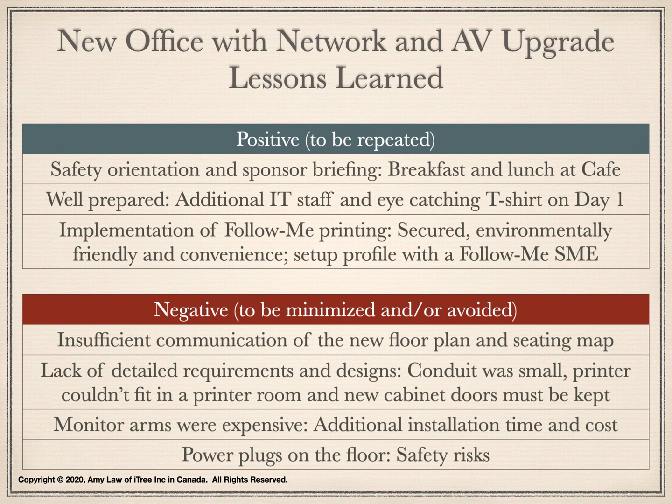The seating map was determined by the senior management. The project had no influence on where people would sit. Having said that, the project could have provided an on-site walkthrough with each team to enable the managers and their people to see their new office space and location prior to the move. Should there be any disagreement, the senior management would make the decision to either make the adjustment or influence their people early.